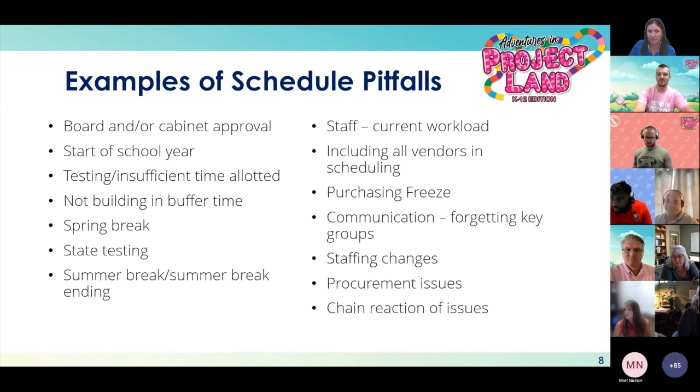Communication, which we've all noted is a very big one. Forgetting key groups. There are many different levels of groups and people that need to be included in communication, starting with the board to cabinet, leadership, the end users, employees in general. And forgetting one of these groups or missing an important communication could cause a schedule delay. Staffing changes. When staff leave or change positions, they take the knowledge and background with them. And trying to catch up new staff on a project could cause the schedule to be delayed.